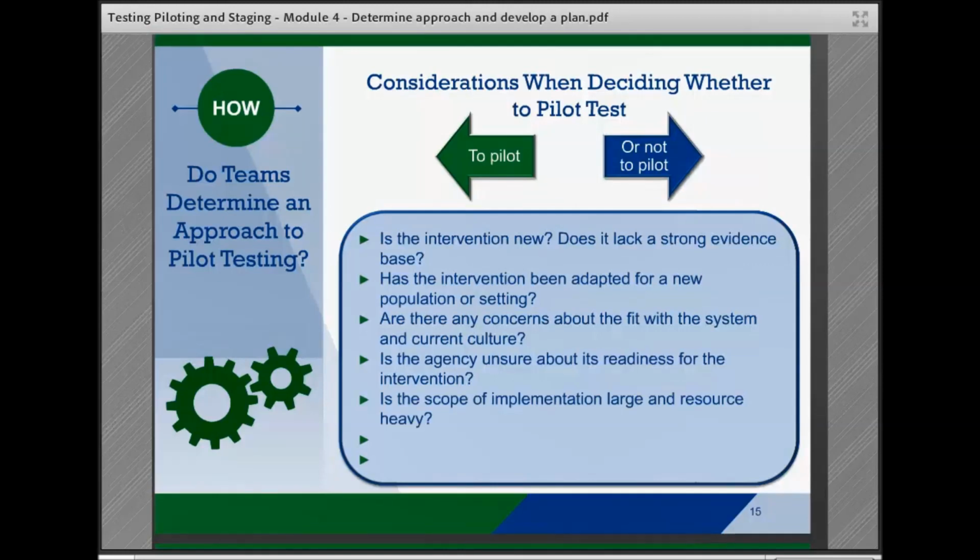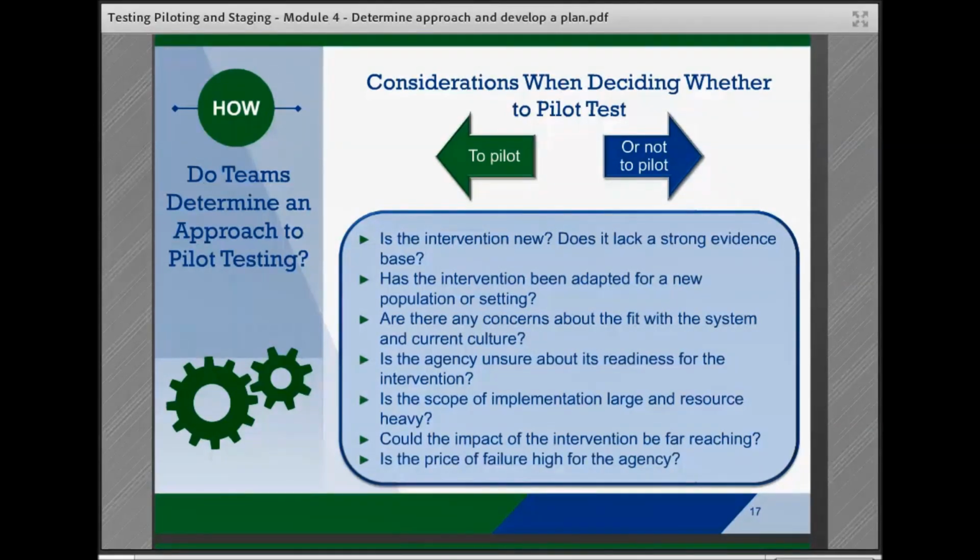Is the scope of implementation large and resource heavy? Could the impact of the intervention be far-reaching? Or is the price of failure high for the agency? If teams choose to not complete an official pilot, either due to timeframes or mandates, they should consider how they can use early implementation sites to test the intervention and make adjustments.